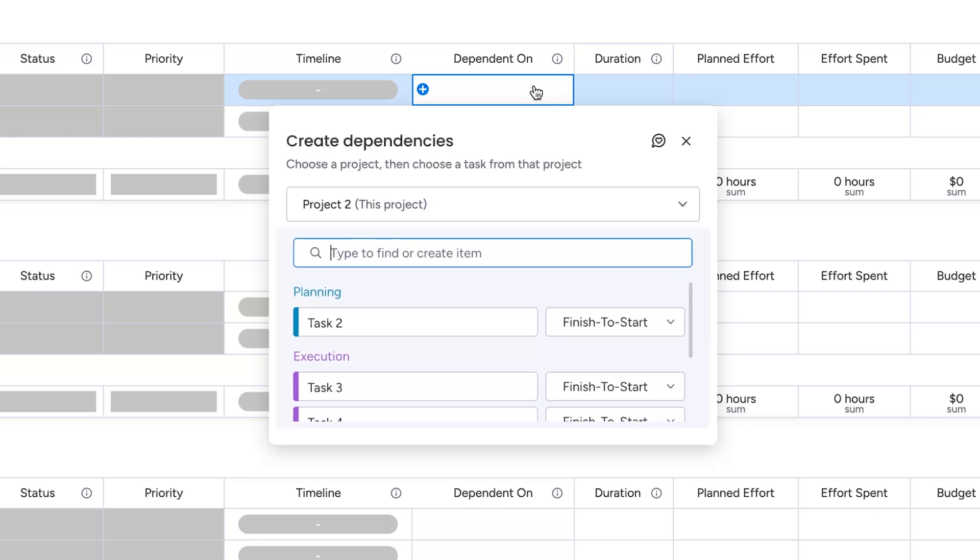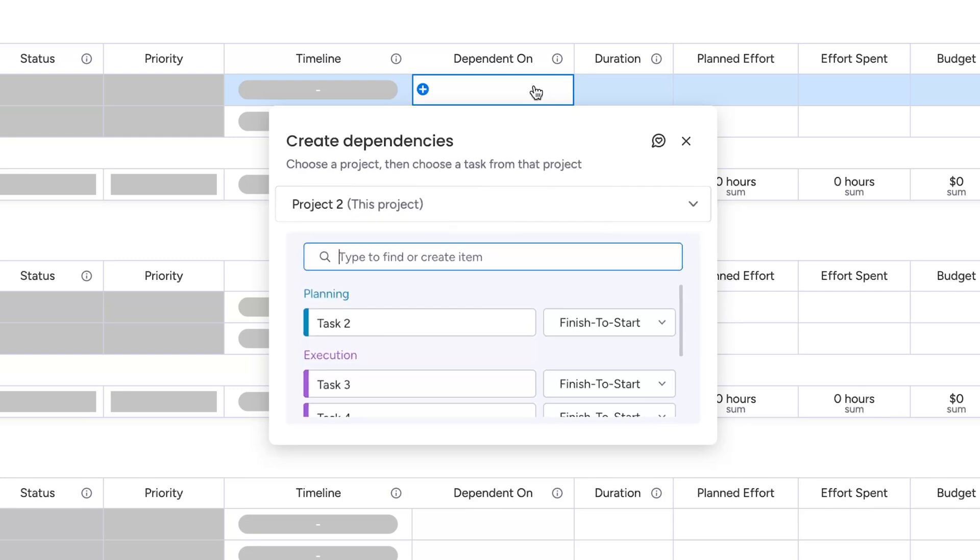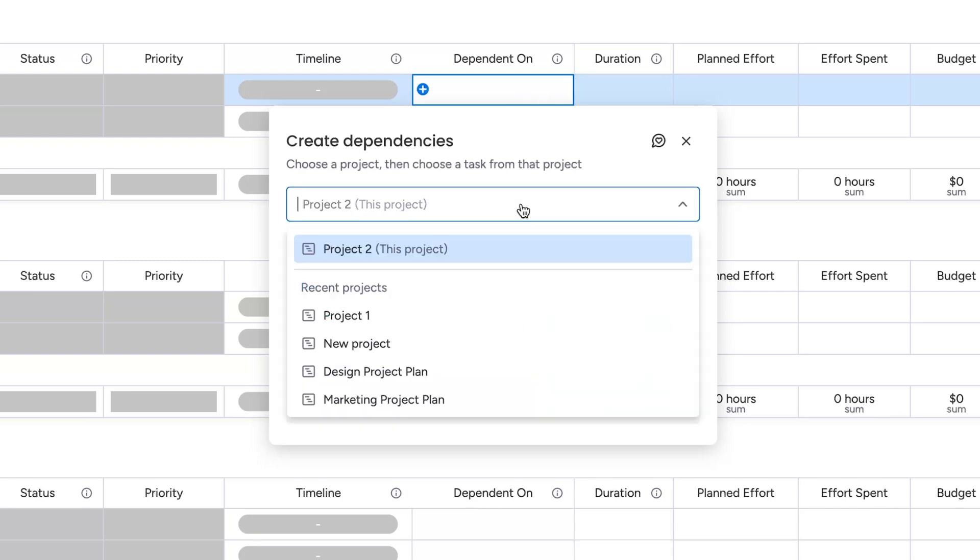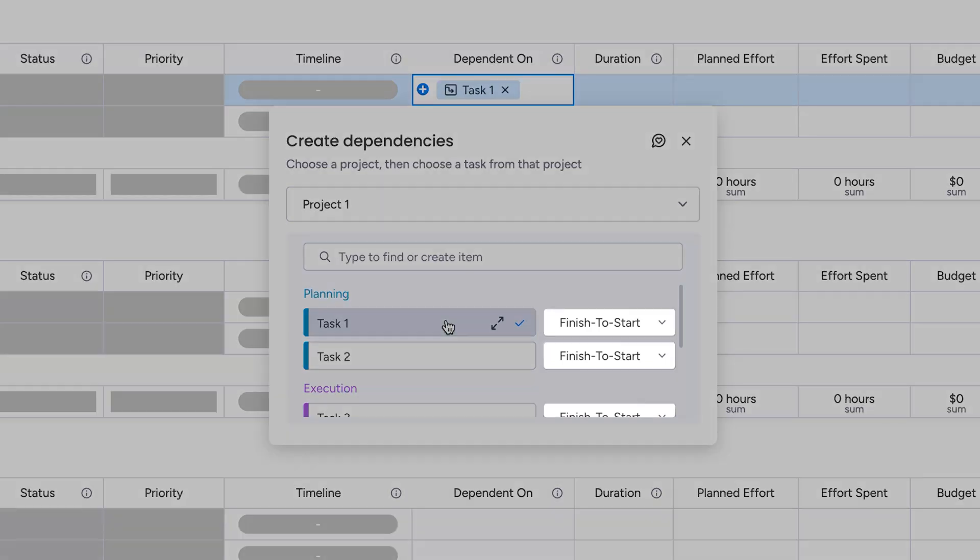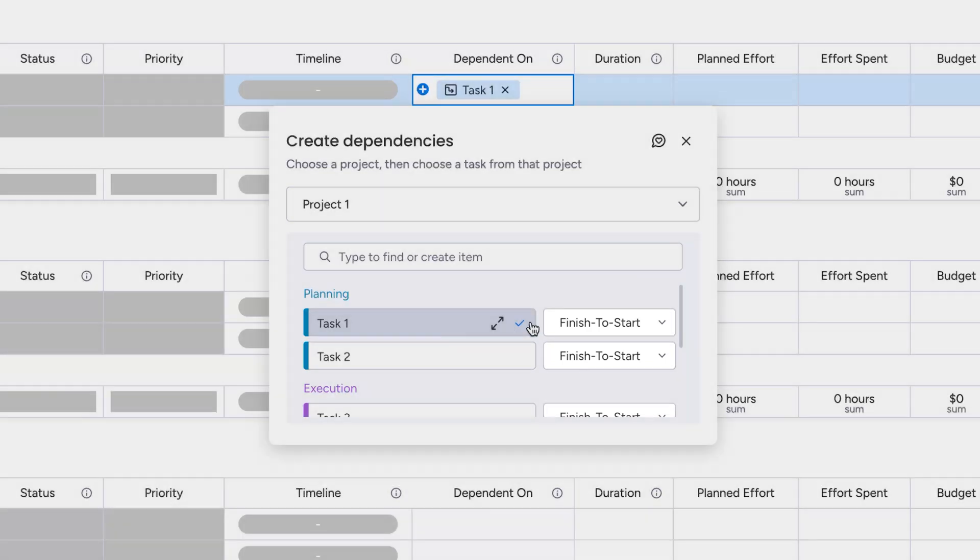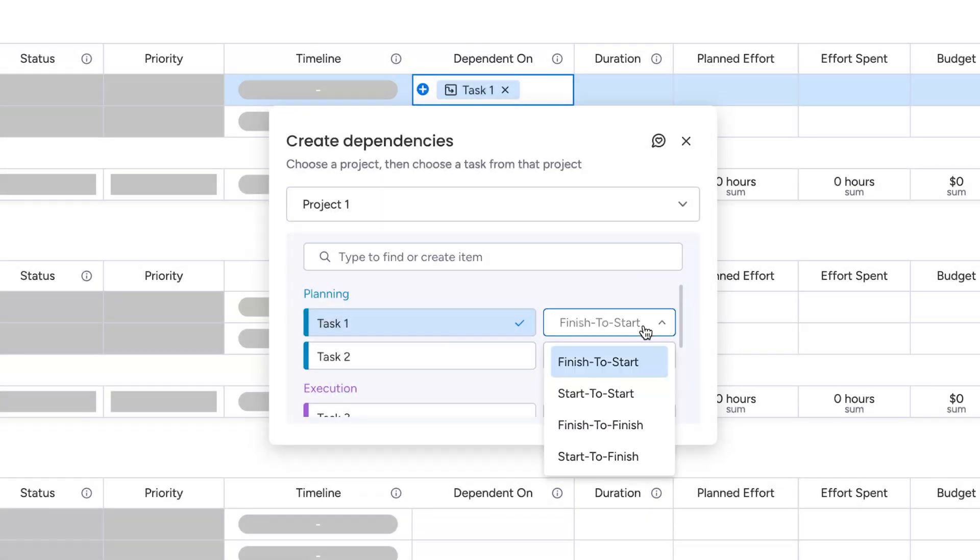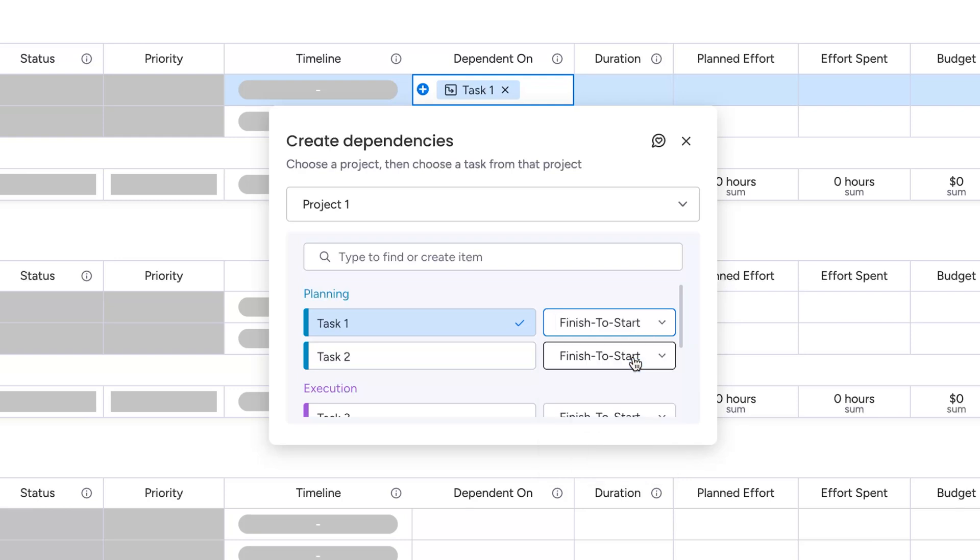By default, you'll see items from the current board. But if you want to go bigger, open the drop-down here to search across all your main project boards. From here, you can also choose the dependency type, like finish to start or start to start, for even more precise planning.